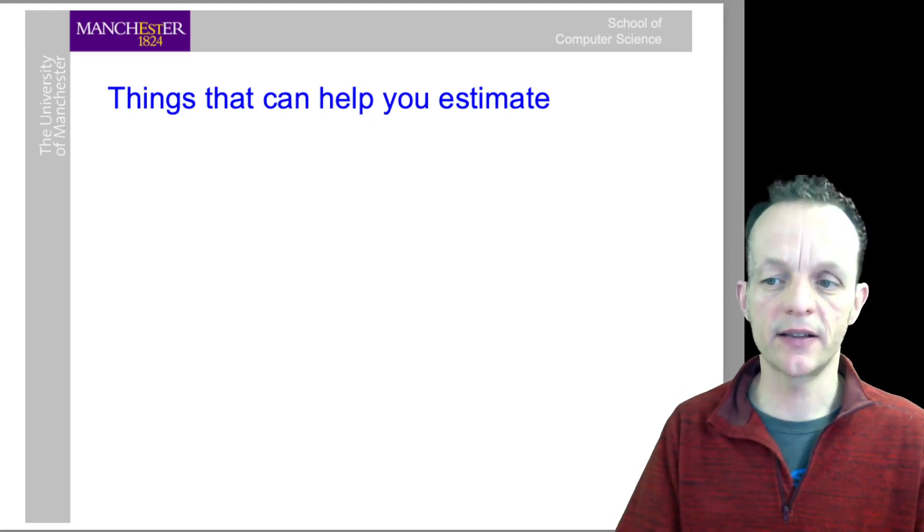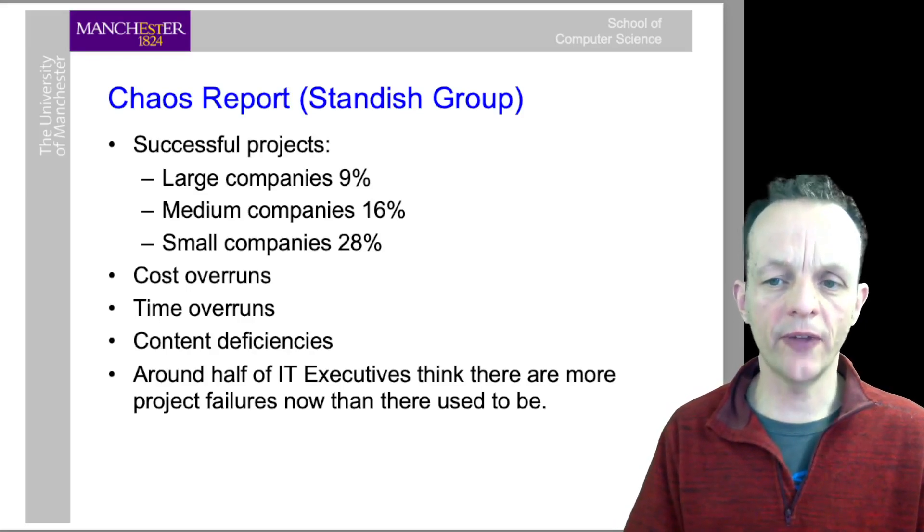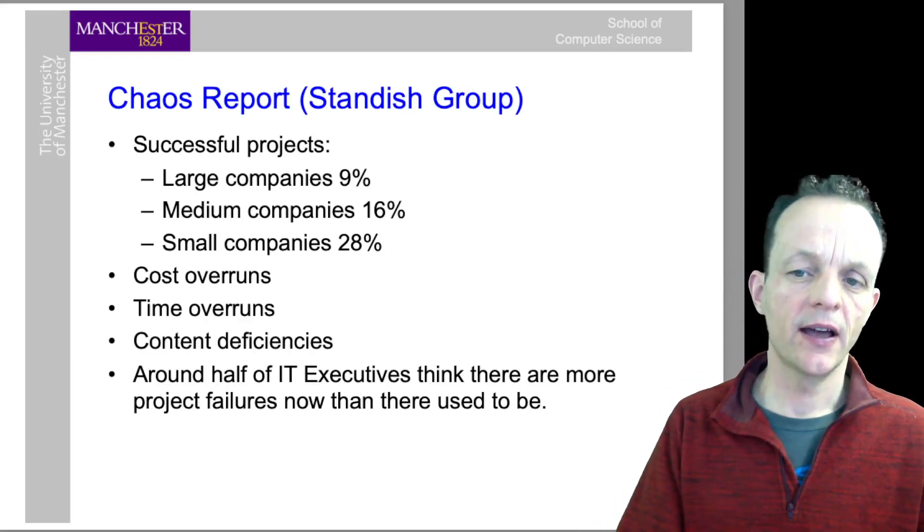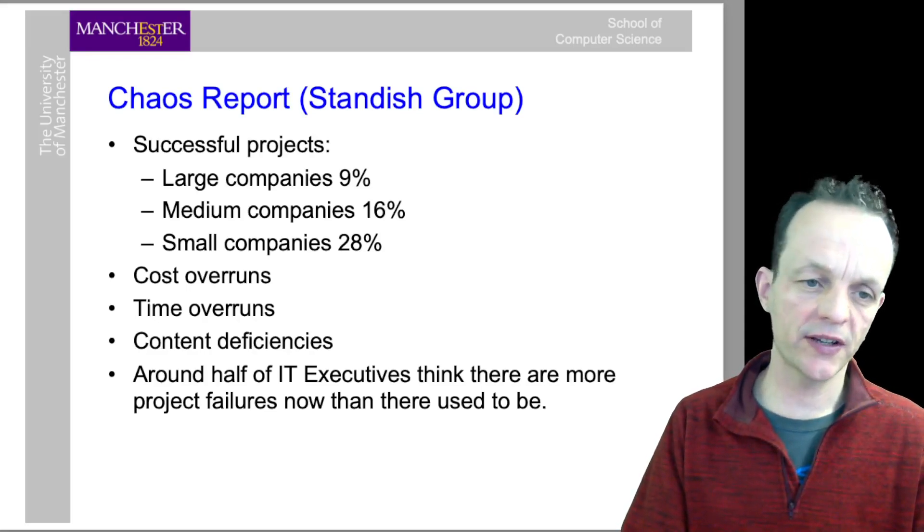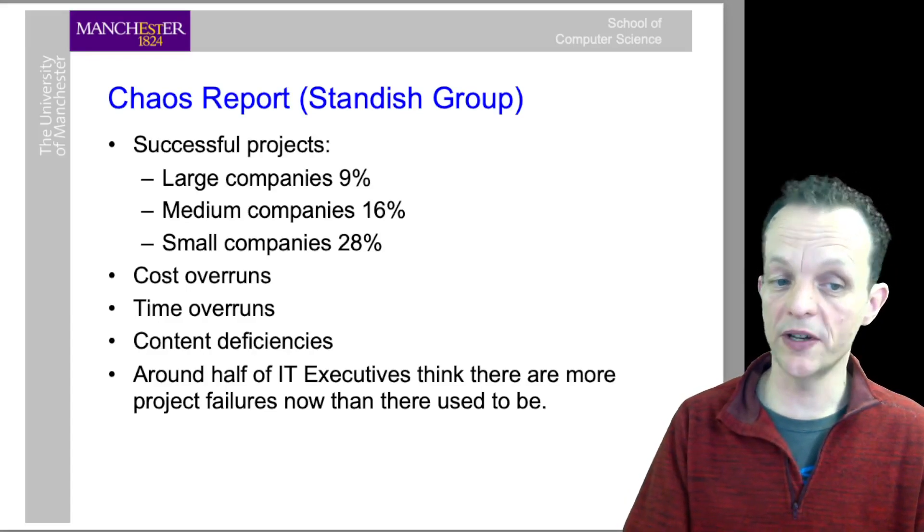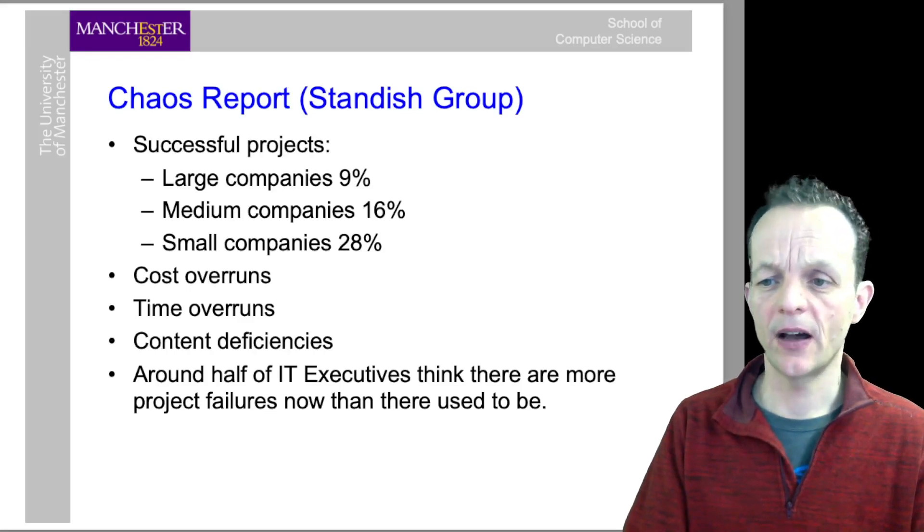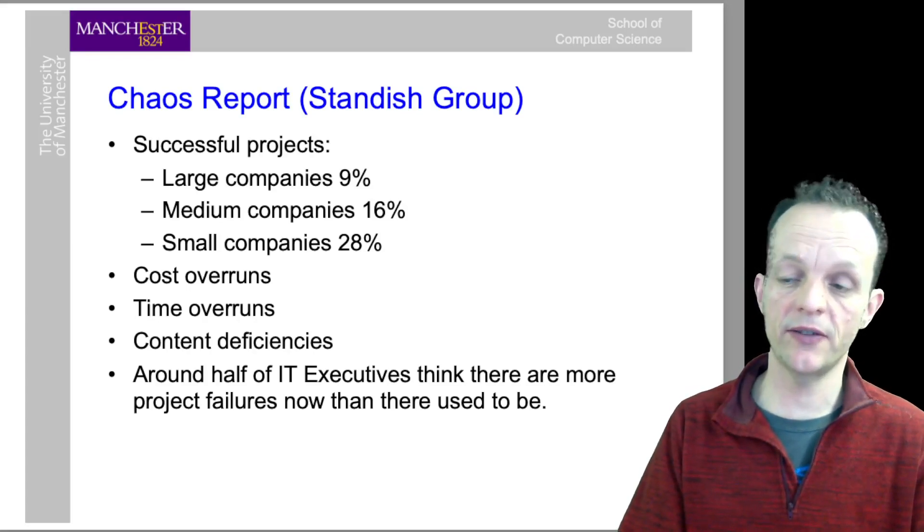To round off, the Chaos Report produced by the Standish Group estimates that successful projects in large companies - less than 9% of large companies have successful IT projects. In medium companies 16%, and smaller companies 28%. But still only 28% of IT projects are considered successful in small companies. That's because of cost overruns, time overruns, and content deficiencies.